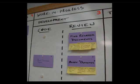Another key feature of Kanban is just putting limits in place. The notion is that maybe we've got three pairs going, so we're going to limit it to three things in progress. We want our pipeline, our value stream, to actually back up so that we're motivated to action. When we have a bottleneck, we want to stop the line, address that bottleneck, and eliminate it as quickly as possible.